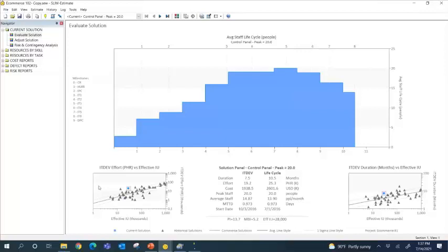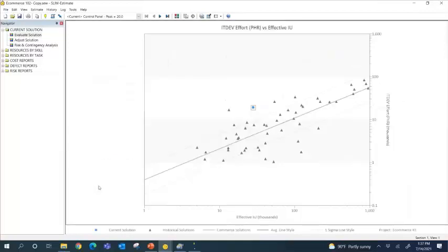If I look to my left, in fact, let me blow this up. This is actually that historical data that we just brought in, all that data that you captured hypothetically and then you analyzed and looked at for those characteristics and conditions. Is now showing up in our estimating tool, and now we can see that historical data, your historical data, alongside your estimate. So this blue data point would be an estimate for effort on the vertical. The trend line that you see, it can be the industry average from that QSM database, or it could be a custom trend line that you created, or that you built, or that you set up based on all of your data. And so right off the bat here, we can see that this estimate is not in line.